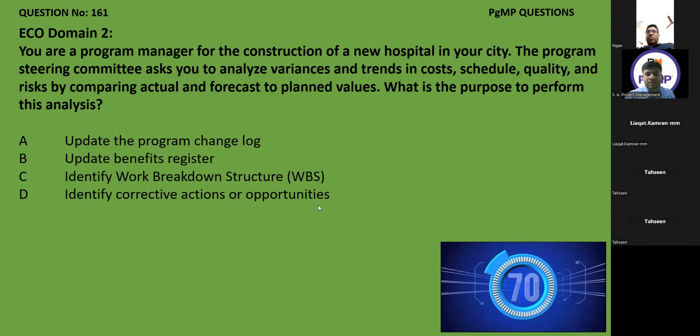Then in the second step, once we have identified the corrective actions, subsequently all the plans, which is cost plan, schedule plan, quality plan, risk management plan, will be updated based on our corrective actions. And then in the third step, whatever is required will be executed. So in both these questions, he is talking about a bigger picture, not one picture.